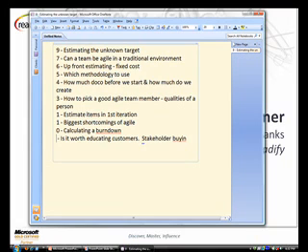So yes, you might do a fixed price contract and you might estimate it's 9 months worth of work. Guarantee in that 9 months the customer's going to want to change scope. Guarantee. It's like death and taxes, customers change scope. How you handle that, if you've educated the customer, they're going to be more open to keeping a timeline fixed and being flexible on scope than trying to keep scope fixed and time fixed at the expense of quality and doing a half-assed job because we're just too rushed.